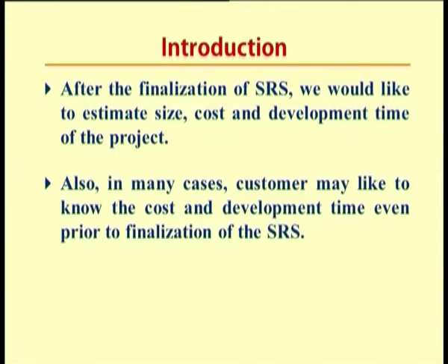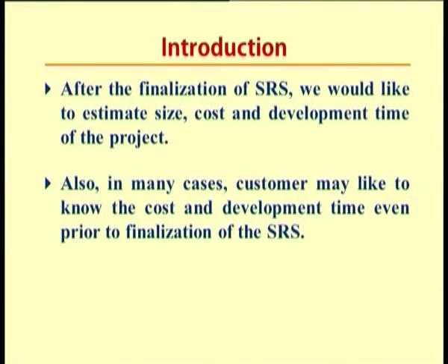After the finalization of SRS, we would like to estimate the size, cost and development type of the project. When I say project planning, we just need to estimate the budget, the time and the size. So these are the three important tasks that are to be performed before I start actually implementing the work. This can happen after the finalization of SRS. So after the finalization of SRS, we would like to estimate size, cost and development time of the project.